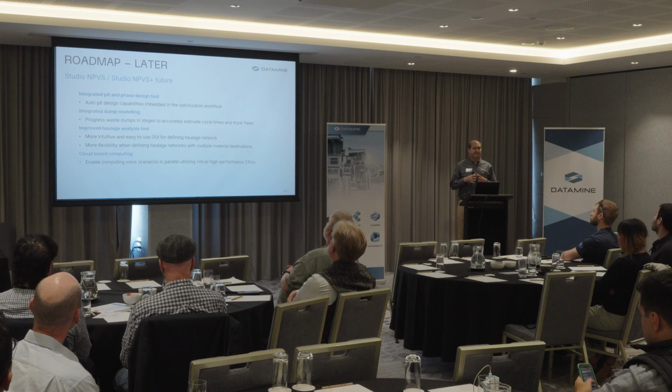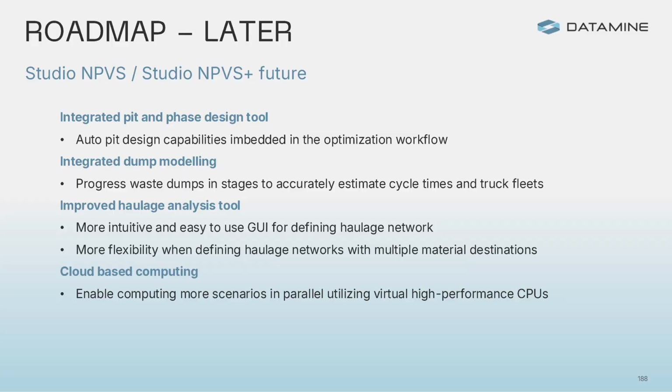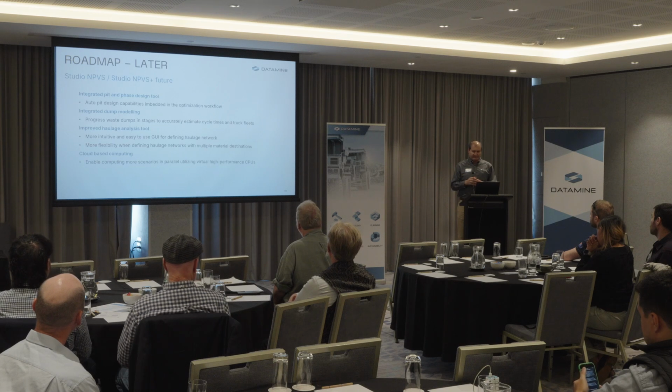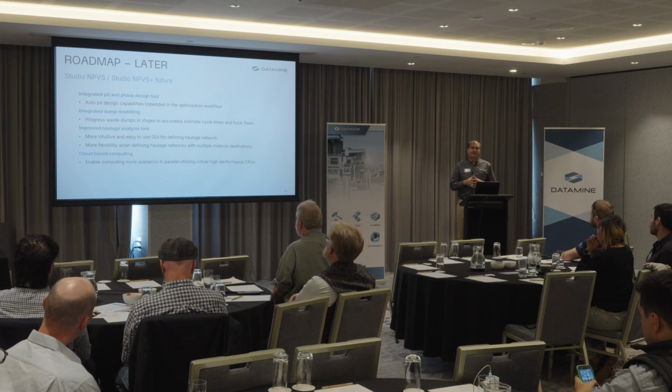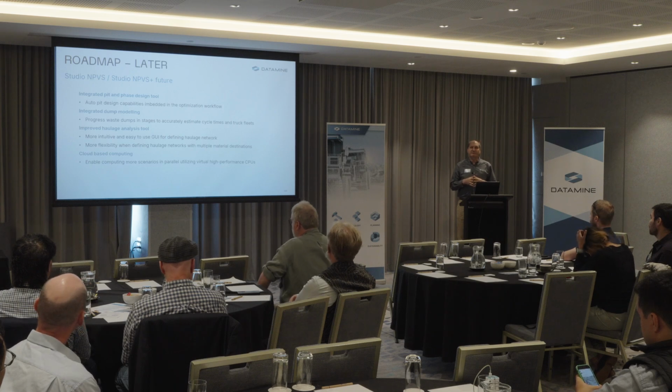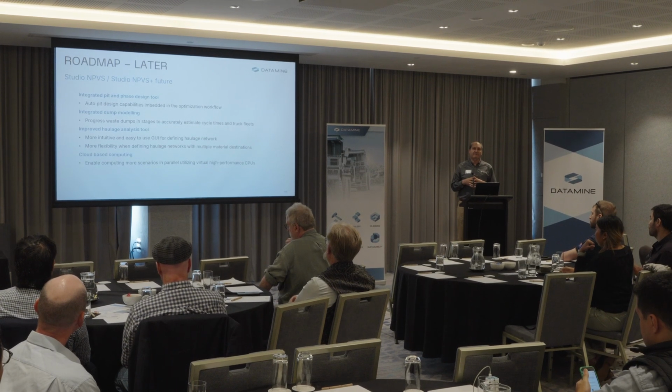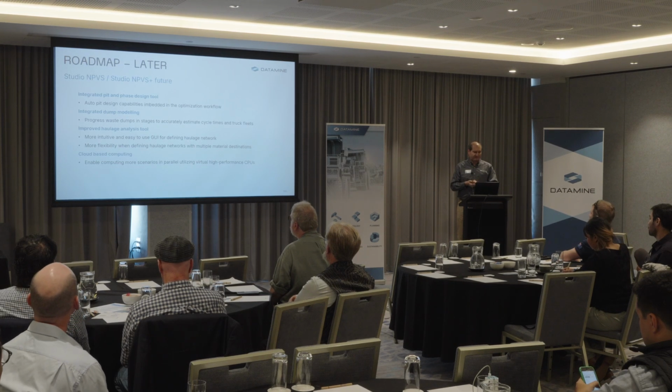Also, we are planning to improve the way we're dealing with modeling waste dumps. In current NPVS, for those of you that attend the workshop tomorrow, you'll see how we can compute the truck hours, but the modeling of the waste dump is defined by a linear increment of how many tons we are placing on the waste dump, which increases the cycle time and truck hours needed. In the future, our plan is to make waste dump progress similarly to mining the pit into pushbacks. So there will be waste dump stages, which will be basically upside down pushbacks. This will create even more realistic life of mine plans with more accurate computation of the truck hours.